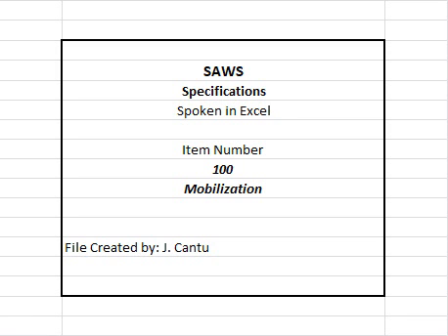Materials on-site limitations: SAWS will not pay materials on-site for quantities that exceed planned quantities. Items that are not specifically listed as individual line items, for example, 6-inch valves that are included in the unit price of a fire hydrant assembly. Fittings, flanges, small diameter pipe or valves, cleanouts, meter boxes or incidentals.